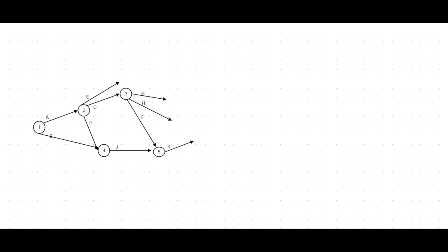Next, M, we can start after completing EH. Now we should complete the EH. E here, H here. Now we should take this side H. It needs to complete. That's also a forward process, right? All the arrows should be forward process. Don't take it as backward. Then here the activities E and H we can complete after the sixth event. Then we can start M.